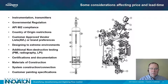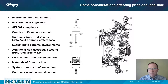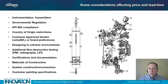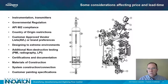Custom paint specifications are also very important to understand and consider. Working with custom paint specifications may not be standard for your piping plan vendor, and sourcing those paints may require going to an outside vendor, which can add significant costs and lead time associated with the painting specifications.